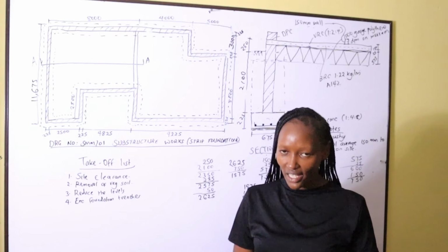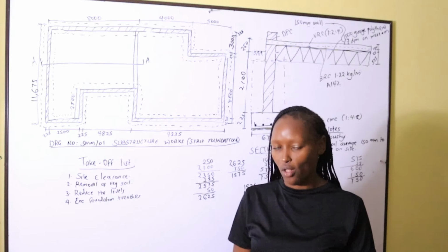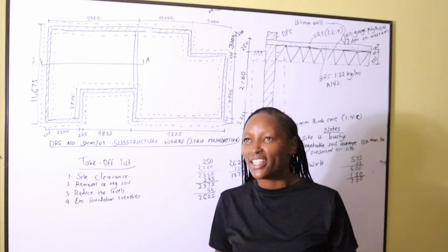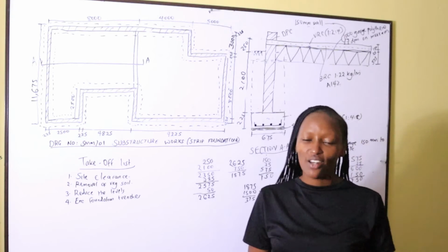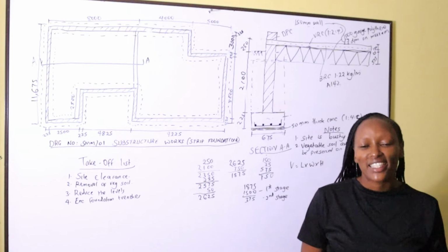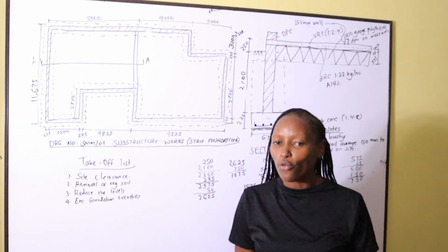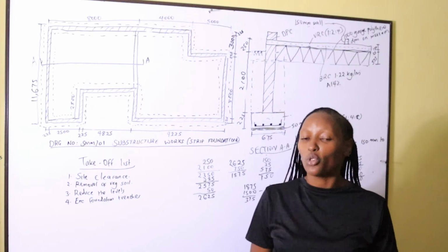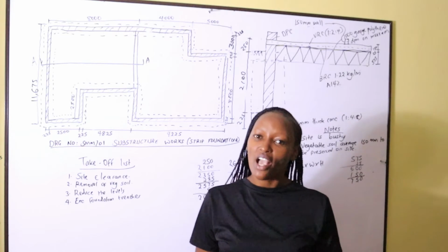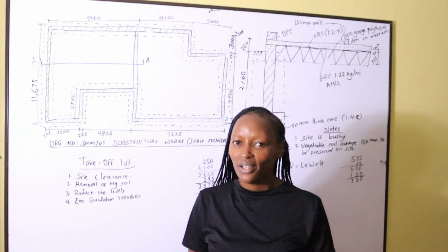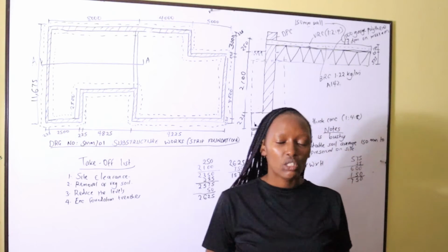If it's the wall, it should be wall all through. Okay, let's go to center line of concrete. Center line of concrete is equal to the external perimeter of the concrete. Then we deduct number of corners of the building multiplied by the thickness of the concrete. All right, so center line is what we shall use.